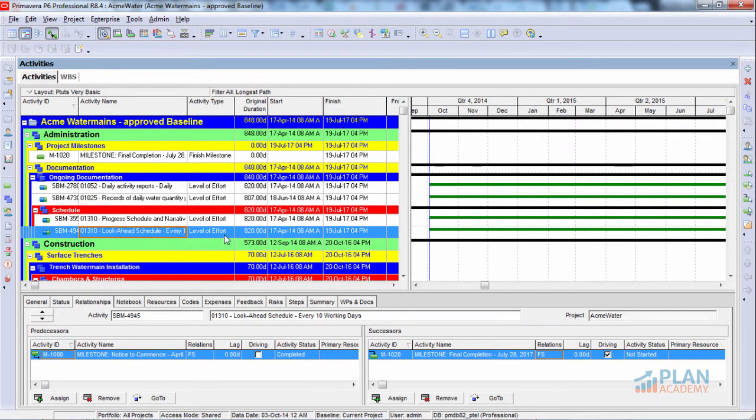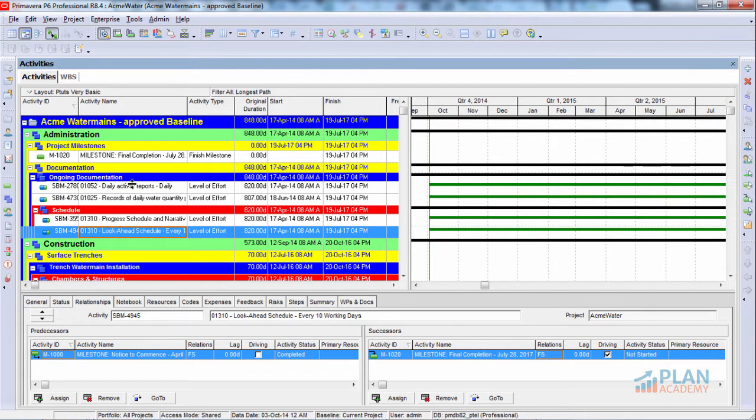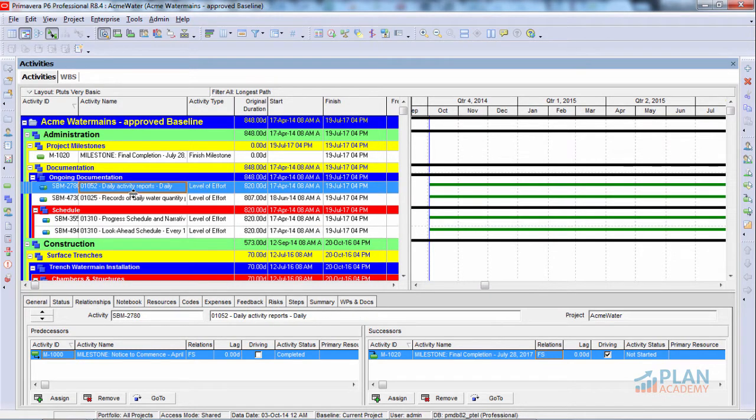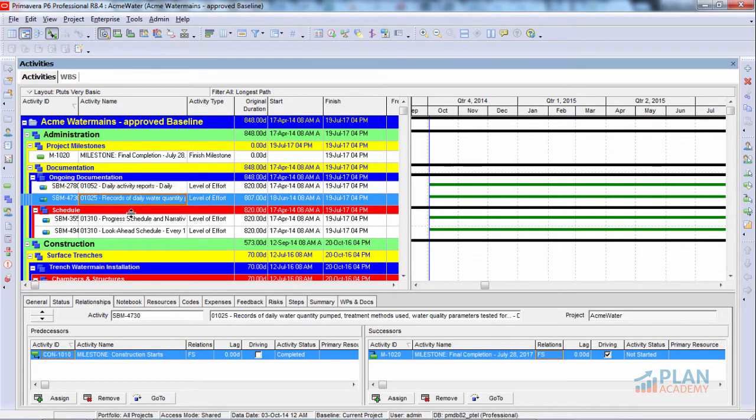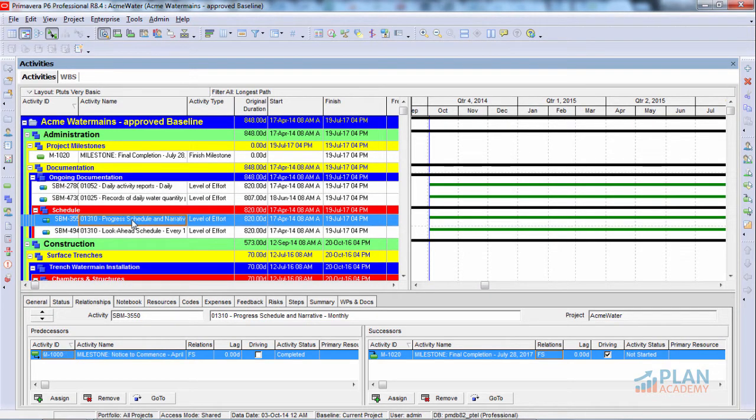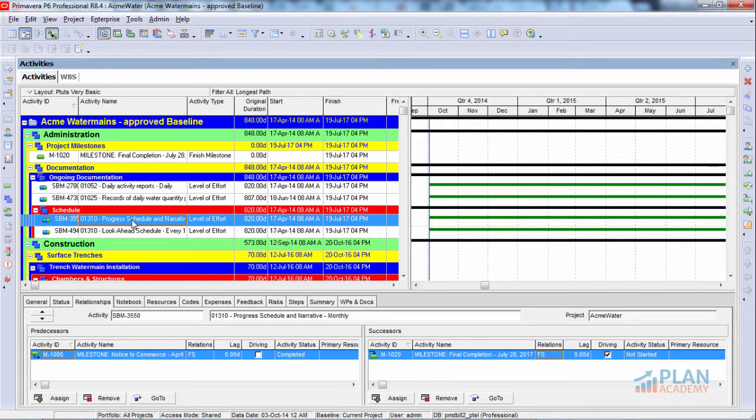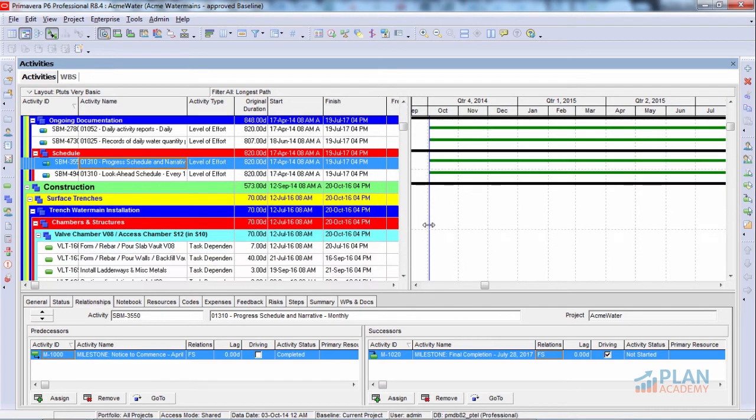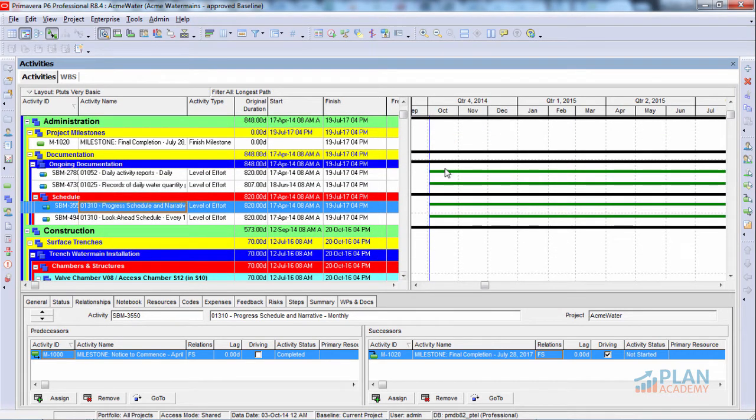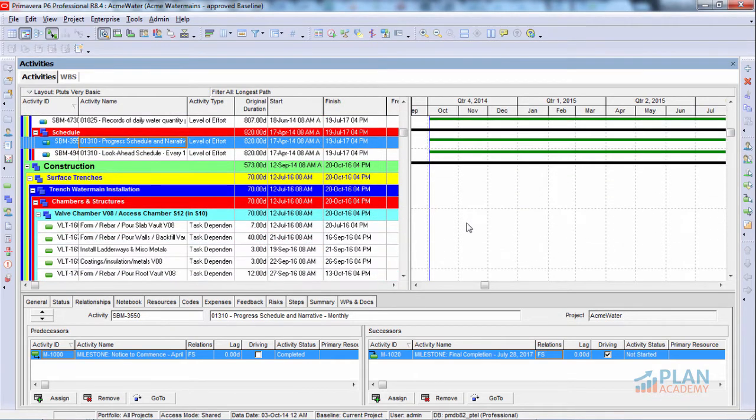These are level of effort activities. Now, when we say longest path through the project, we really want the path where there are no delays between activities, where free flow between activities is really zero. And if we have level of effort activities in there, these are not true work activities, true driving work activities. You probably know that level of efforts are summary activities. So really, should level of efforts be in our longest path? No, they should not. So we have a problem there with the critical path, longest path filter displaying level of effort activities.